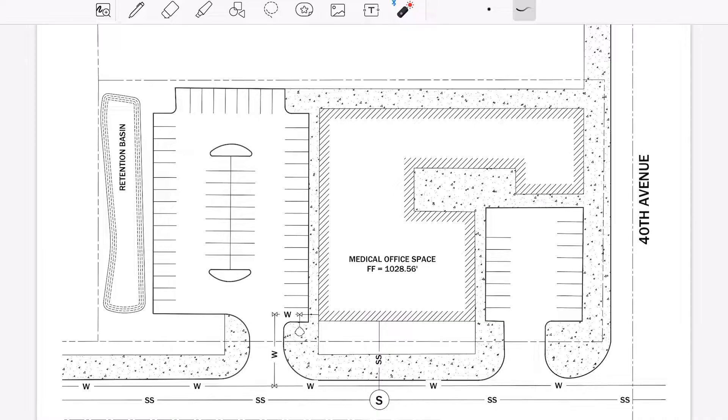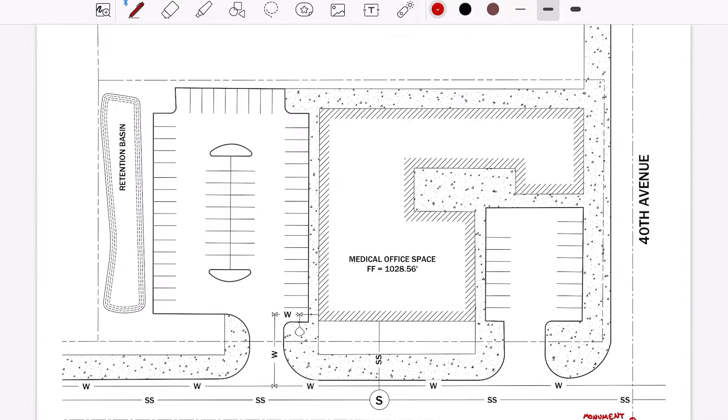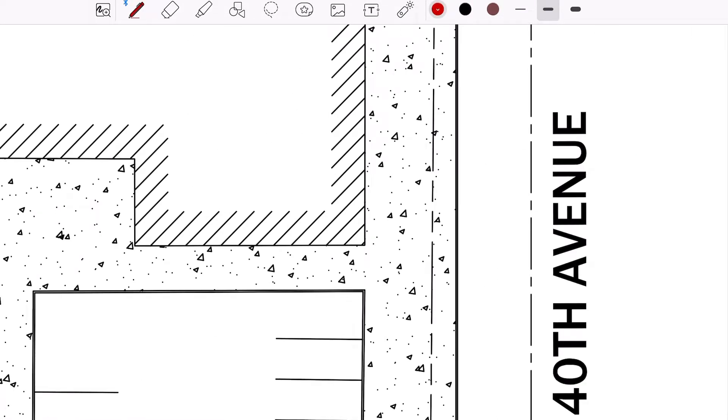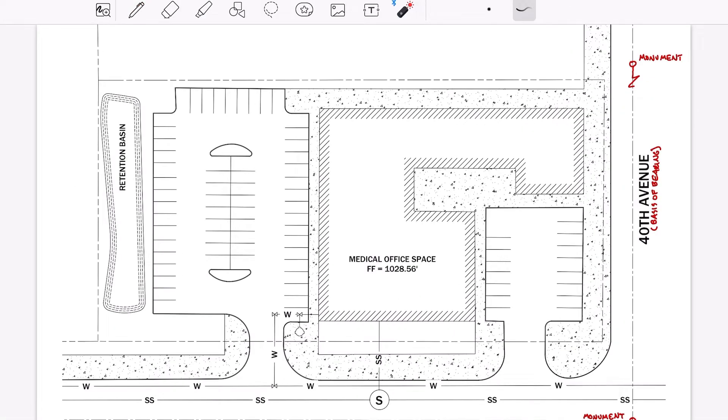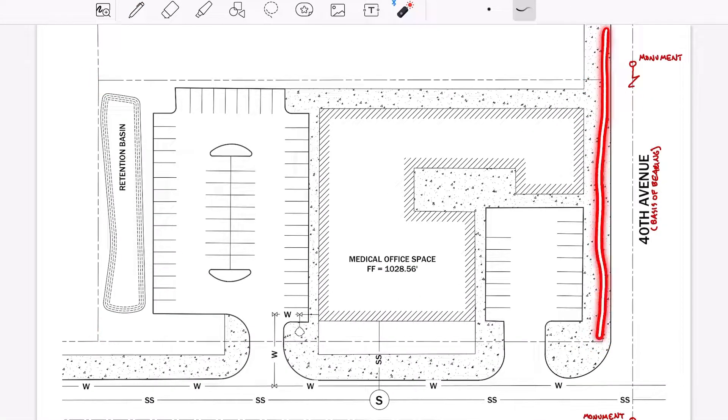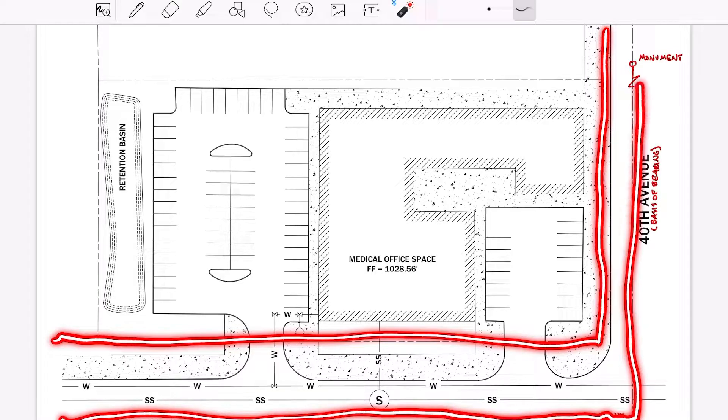At project outset, a registered surveyor is typically utilized to verify project location horizontally and vertically by checking into the project basis of bearings, nearby monumentation such as property corners or property lines, and the vertical benchmark assigned to the project.